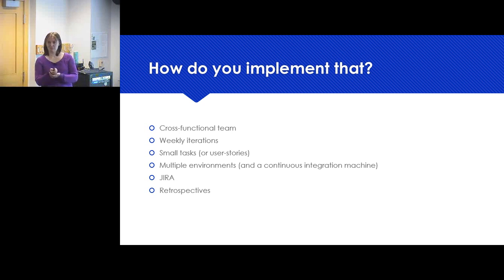Another benefit is when your product manager comes and asks you, how long is this going to take, or how much effort do you think this is going to take to build it? Right. Yeah. It's much easier to estimate a small task. So when you have a big task where it's just like, build this new view, you're like, I don't know. Right? You give a ballpark, and you hope you're close.